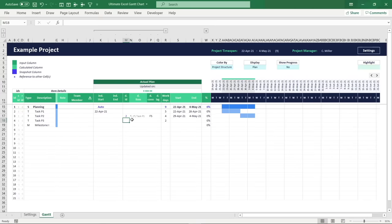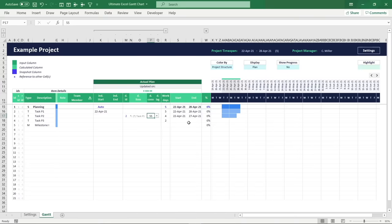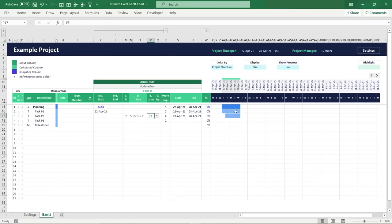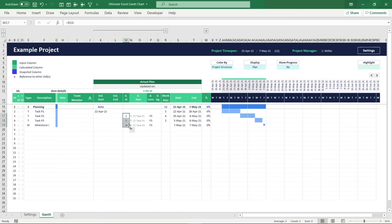With this dependency engine, you can make one item dependent on another by creating a connection through an intuitive ID system. The columns next to the referenced ID instantly display all fundamental information about the referenced item. What makes this feature so incredibly powerful is there are four possible dependency connection types to choose from: forward scheduling finish-to-start or start-to-start, or backward scheduling start-to-finish or finish-to-finish. The dependency engine enables you to set up consecutive dependencies in a matter of seconds.